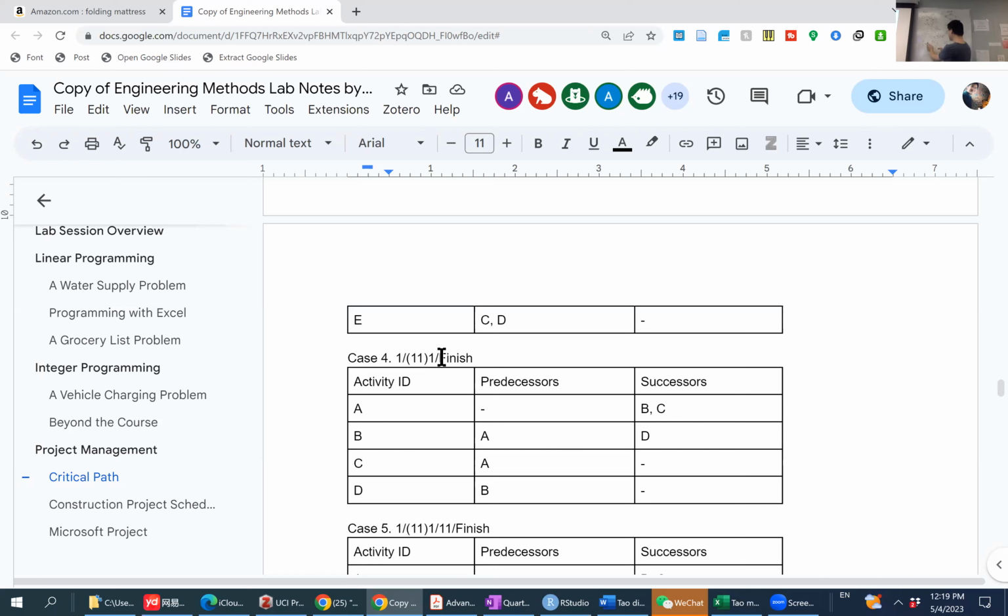So in this case, let's call the nodes 1, 2, 3, 4. Nodes 2 and 4 are connected by activity C, that's fine. At the same time, it's connected by B, goes to a different node and back to it by D. This is also fine, because you get to 4 through 2 activities in the second half.